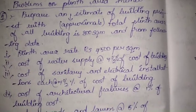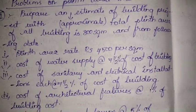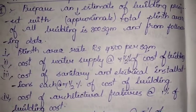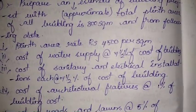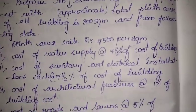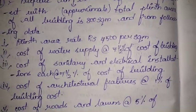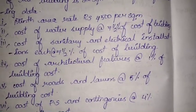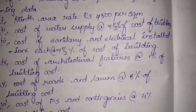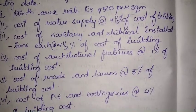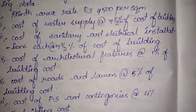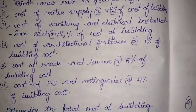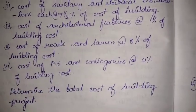Let's solve the first example: prepare an approximate estimate of a building project where the total plinth area is 800 square meters. The given data is: plinth area rate is 4500 per square meter; cost of water supply is 7.5% of total building cost; cost of sanitary and electrical installations each at 7.5% of building cost; cost of architectural features at 1% of building cost; cost of roads and lawns at 5% of building cost; and contingencies at 4% of building cost. Determine the total cost of the project.